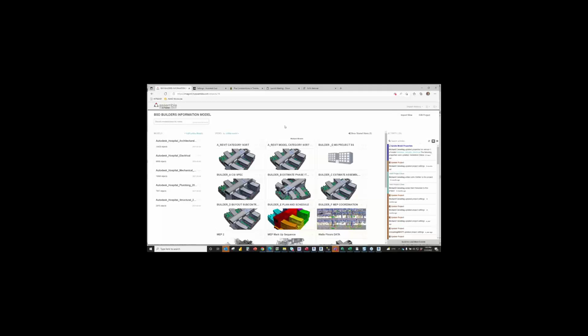So you'll see that I've titled this project Builder's Information Model, which is a little play on words. The design models that we get are really a representation of what we leave behind as a builder, but they don't have the same type of codification beyond alphabetical order on text that builders typically use, like estimating phase codes or accounting cost codes or scheduling activity IDs.